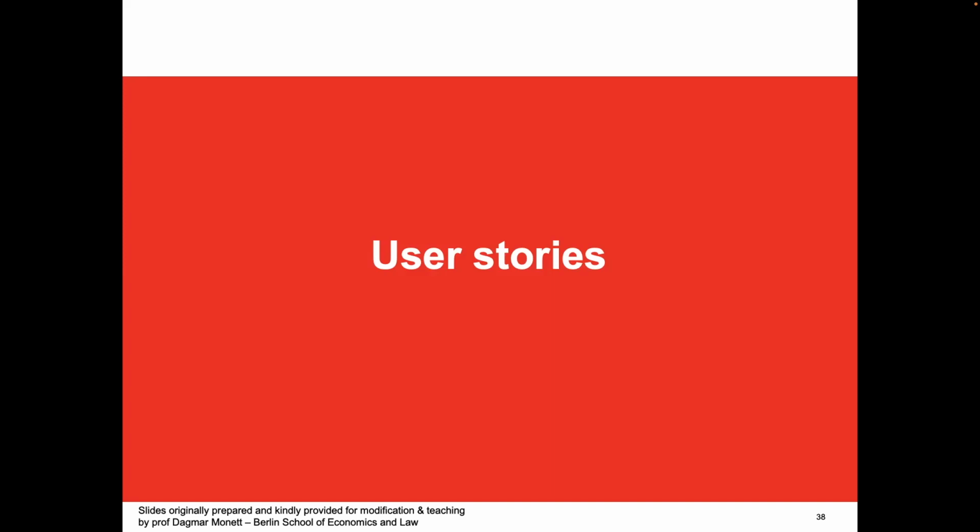They basically tell the story of what the team should build and deliver based on what the user requirements are, right? There's a product backlog where they are put according to the prioritization of the requirements. So the stories based on requirements which are of high value will always be put first, and they will be worked on first, and so on.